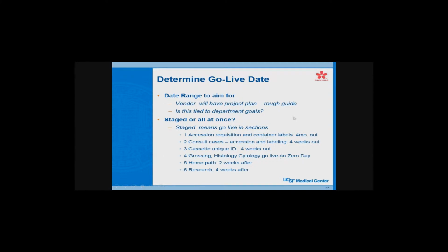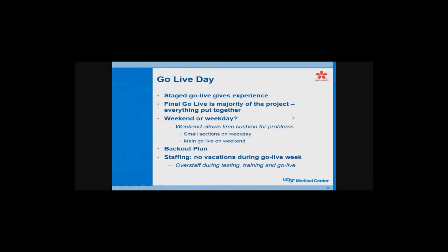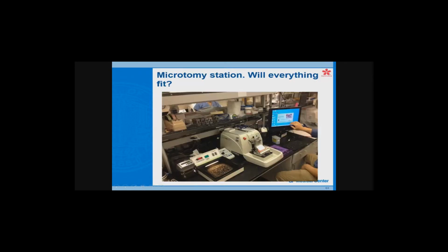Implementation, you've already got your implementation team. You've got to put in all your hardware, get all your training done. We did a staged go live, so we didn't do everything at once. We did some of the smaller things earlier, some of the smaller things later. Did histology on the main go live day.